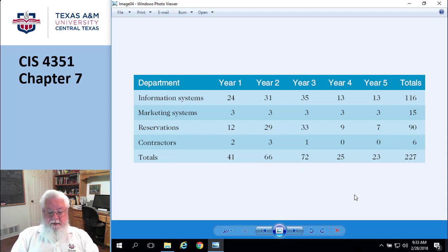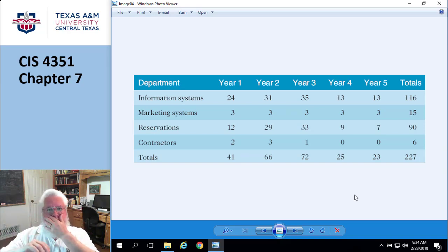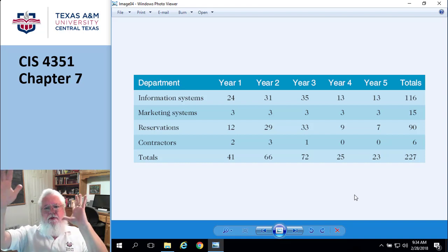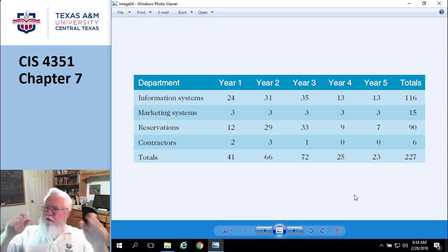So the reason for doing it this way is you basically have to calculate this in an Excel spreadsheet, because if they negotiated a higher salary for your workers, you need to be able to go into the Excel spreadsheet and go doink, and poof, it produces a new one. So you have to be able to show your math.